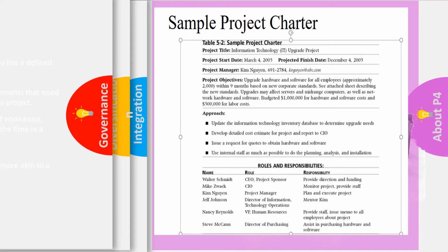So ideally, you need a problem statement, the business need, the SMART goals: specific, measurable, attainable, realistic, and time specific. How long it's going to take. But we know how long this project is going to take because in the assignment brief it said it should take between 1 and 3 months. So you've got your time there in terms of what you want to look at. Then you've got your scope, and then your team, and then possibly milestones that you might have during the project.